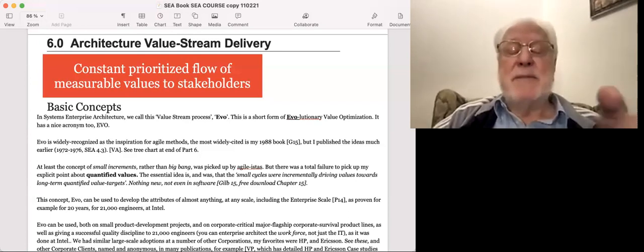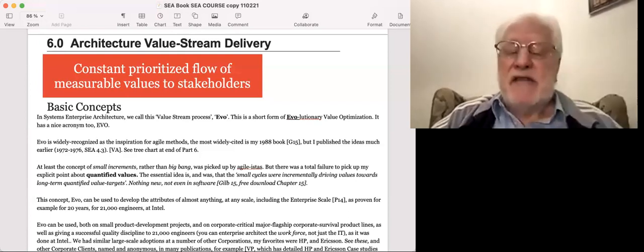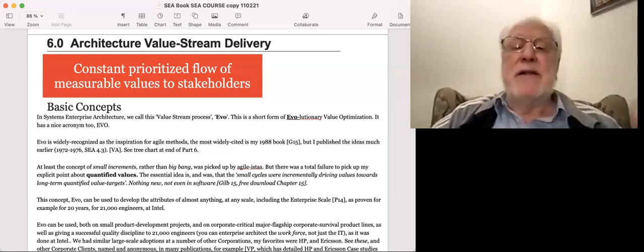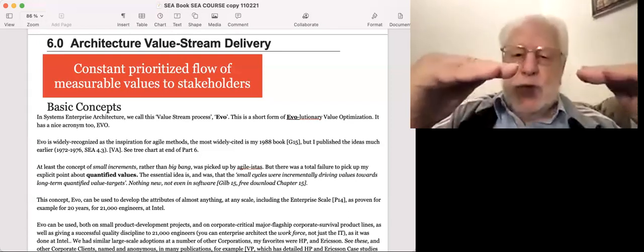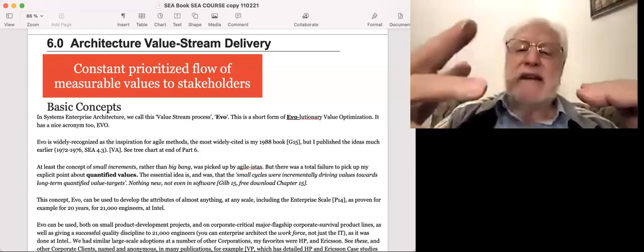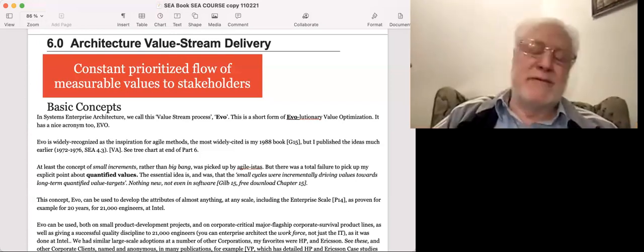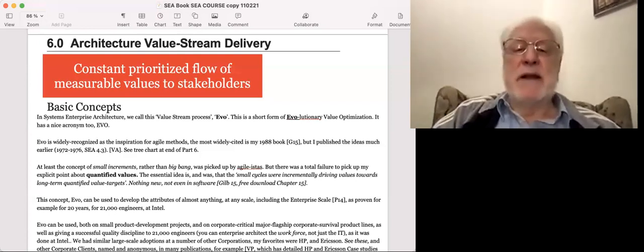Anyway, make a distinction between the two types of constraints, both of which the architect must respect. The binary constraints from the outset. You must not suggest an architecture that violates European law if you're subject to European law, end of discussion. But the other kind of constraint, you might only learn gradually, step by step, that you have not reached the 2/3 necessary of the population for using the app. And then you have to put in tactics, like we'll pay people 1,000 kroner if they'll download the app, or something like that, to change your architecture so that you reach your minimum levels.